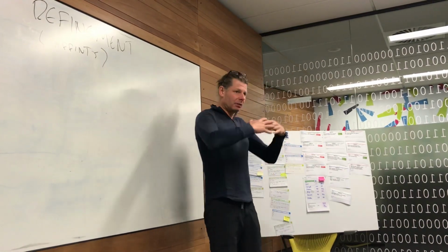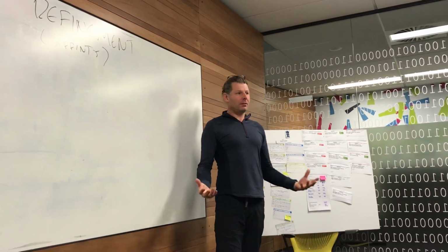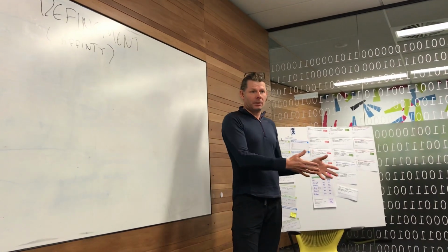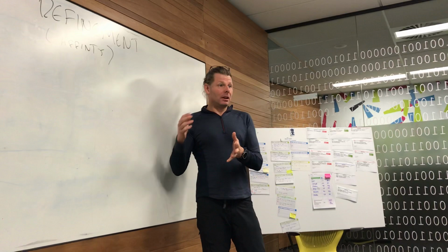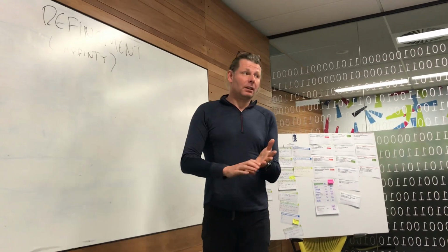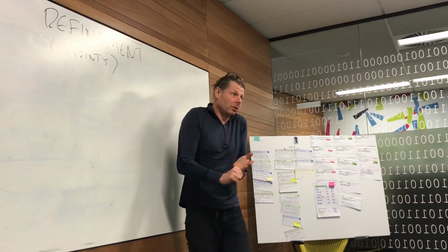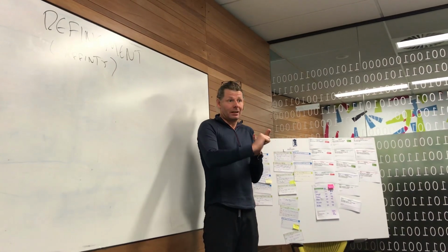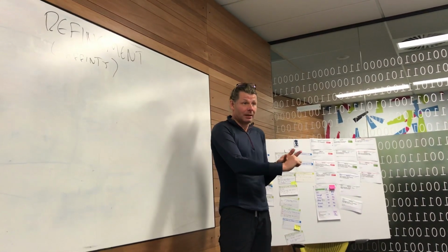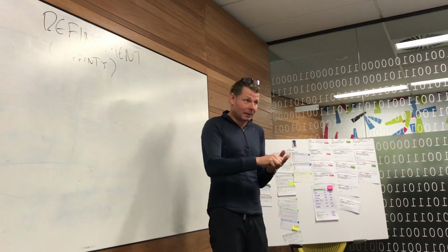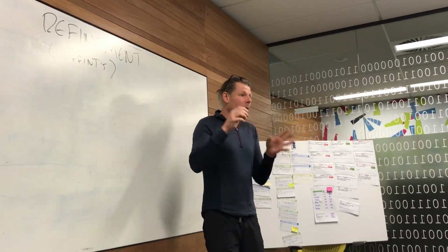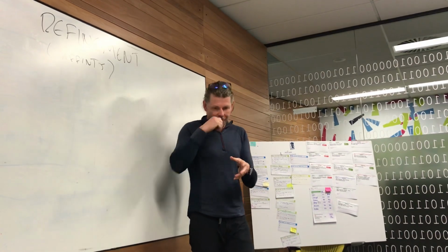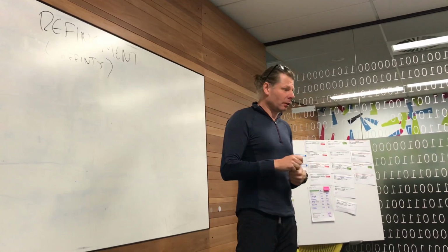Think of refinement as an umbrella term of all of the activity we need to do before we get to sprint planning. Now, many people actually point and size it beforehand, and that's legitimate. If you want to do that, that's fine. My personal preference is I find greater clarity if we do it as late as possible, which is in sprint planning. So the planning poker happens in planning, it's not refinement poker. But there's other things we can do to size it, to get a rule of thumb of the right kind of size. But refinement means other things as well.